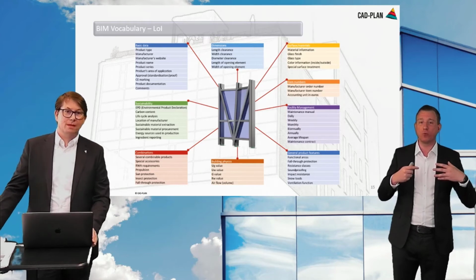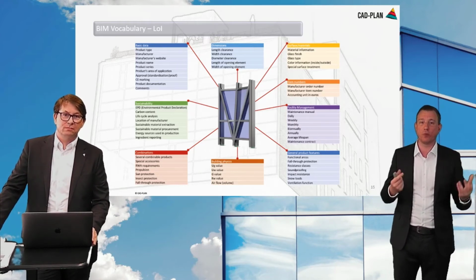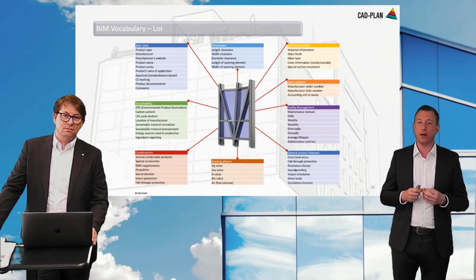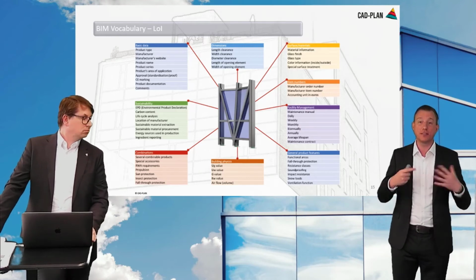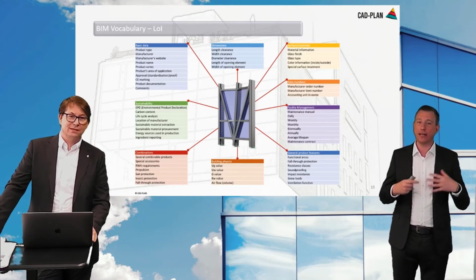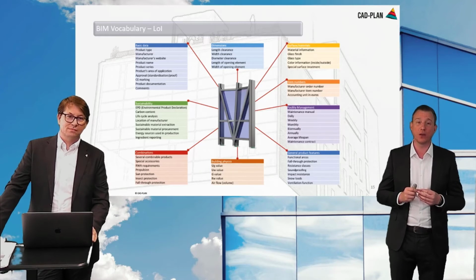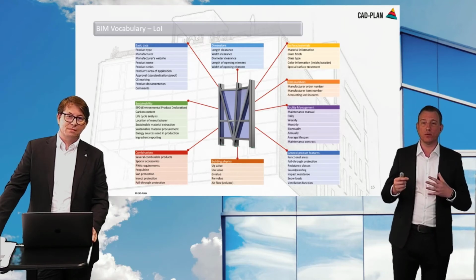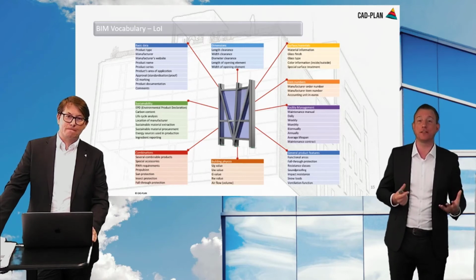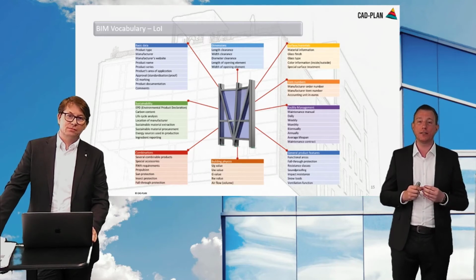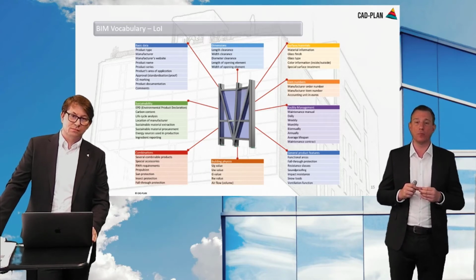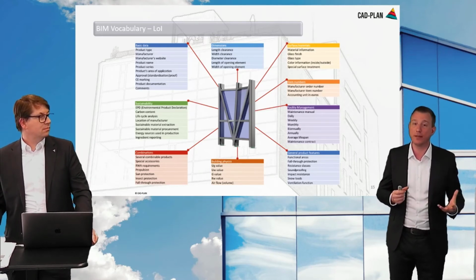Does my facade meet the required informations? Can I approve these required informations? Does the facade have other add-on parts like sun protection? And what does this sun protection do? And what about electrical installations and where they are located? Which insulation class products are installed? And do they meet the specified safety standards, for example? Are there maintenance intervals, and which ones? Can I supply test documents or other documents like the CE documents, for example?